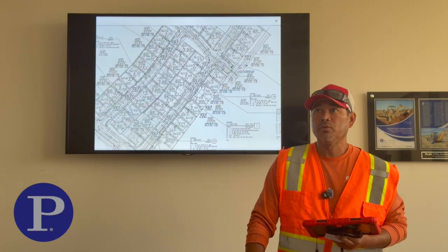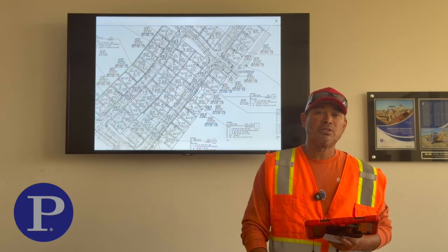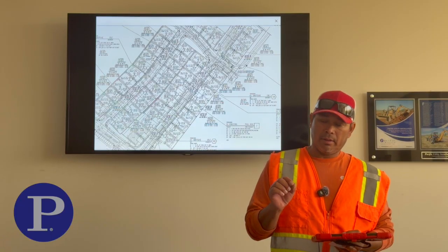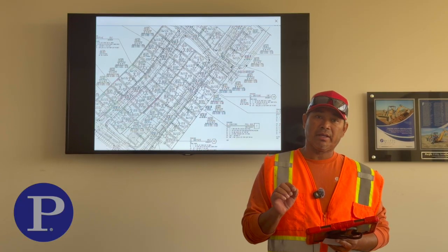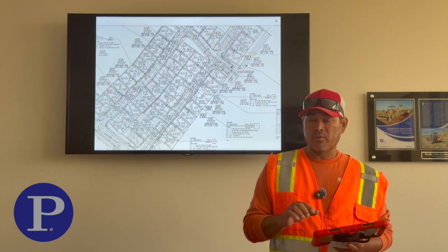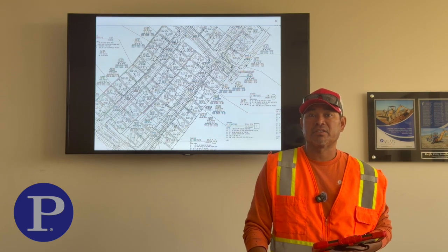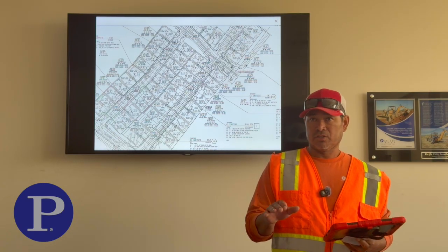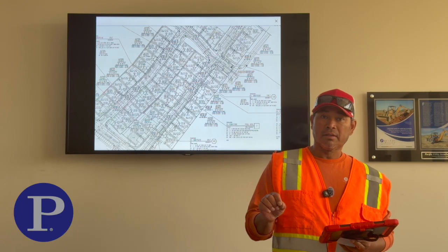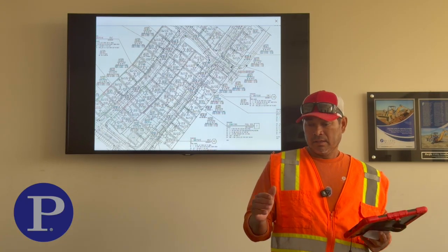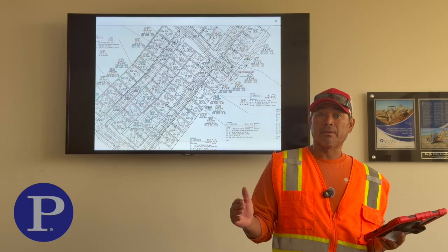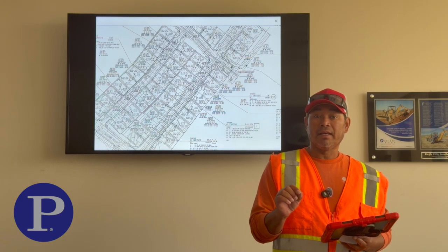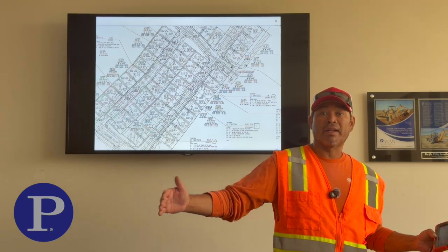I want every one of you to understand something that is really important, in my point of view and I think in the company: the price for every single angle that we order is different than regular pipe, the regular linear footage. If you order a 90, it's a different price, and I can say certainly it's more than double the regular pipe. So if you order a 90 that is only 7 feet, it's going to cost you the same amount or maybe a little more than the price for the whole 20-foot length of pipe.